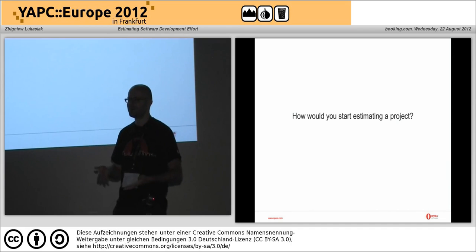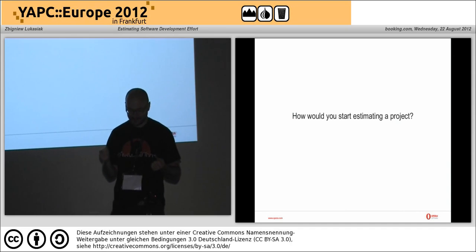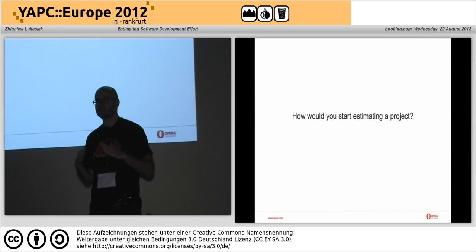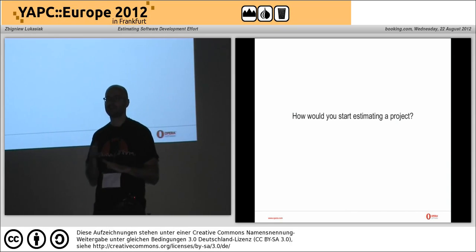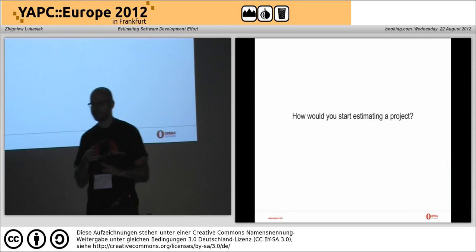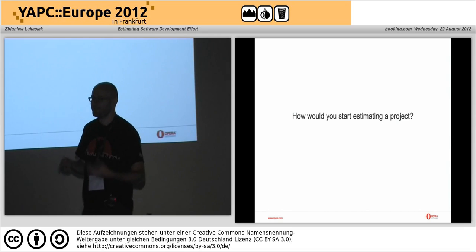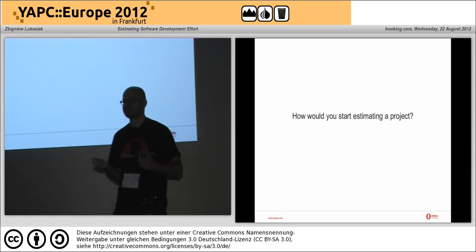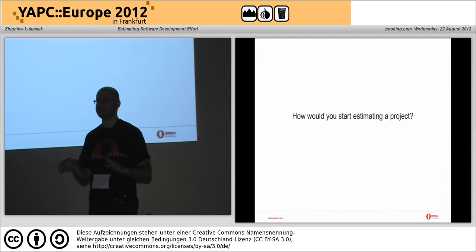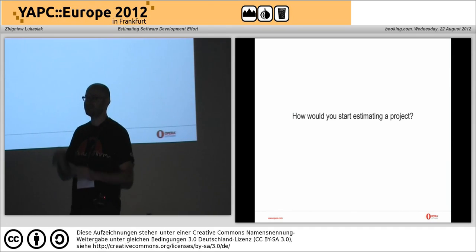Estimation is an objective number - how long it would take if you wouldn't remove anything or change the environment of the project. If the sales guy gives you a number, it has no real relation to the estimation, but it can be your target if it's reasonable. The project manager will then need to remove something to make the estimation meet the target.